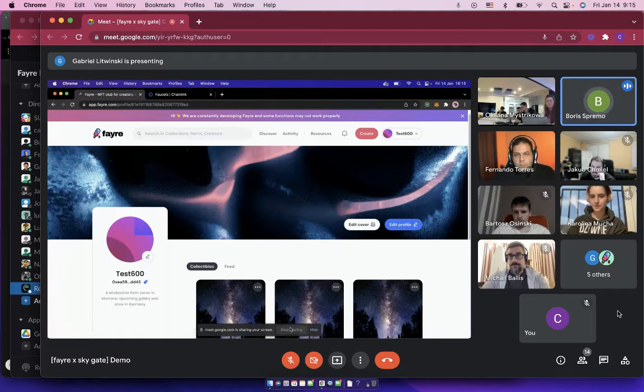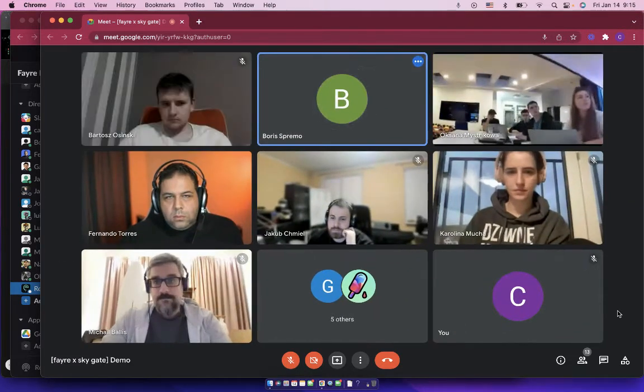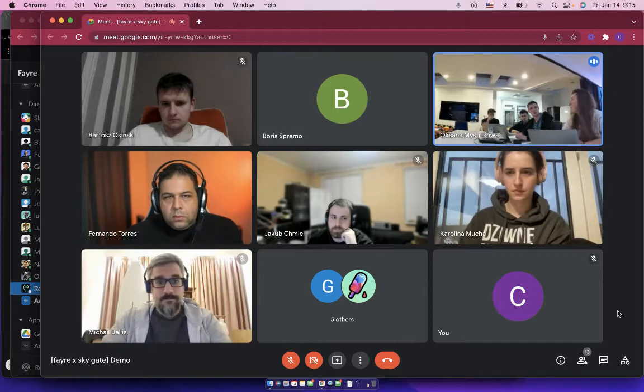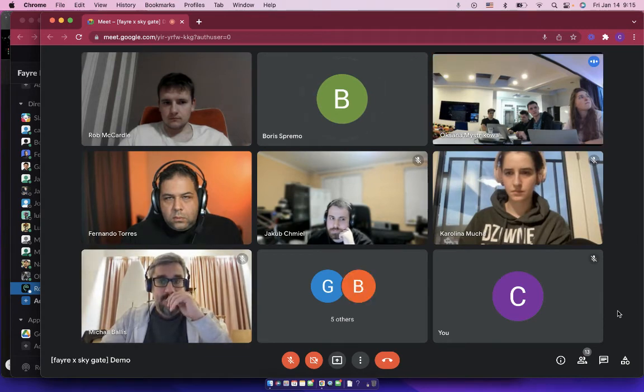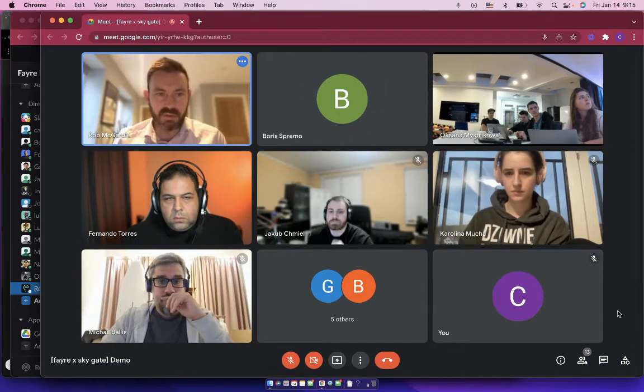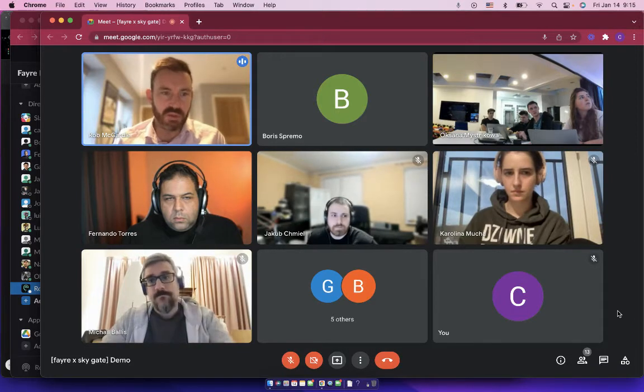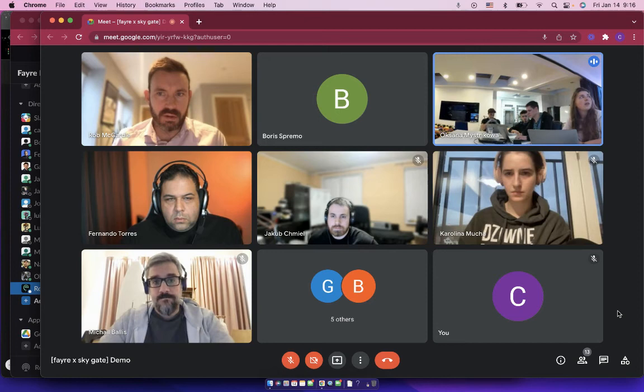Do we have a repository of the bugs? Where do we keep track of the bugs? We're keeping it on Asana, as Nasar told us, that we should just add a subtask onto the Asana user story. Okay. Oksana, if we spot problems like this one, do you want us to filter them through you and then you put them onto Asana to avoid duplicates and make sure you've understood them properly? Or do you want us to add them directly onto Asana? I think if you find something, you can just put it directly into Asana, and in case we don't understand what it is about, we could ask you.